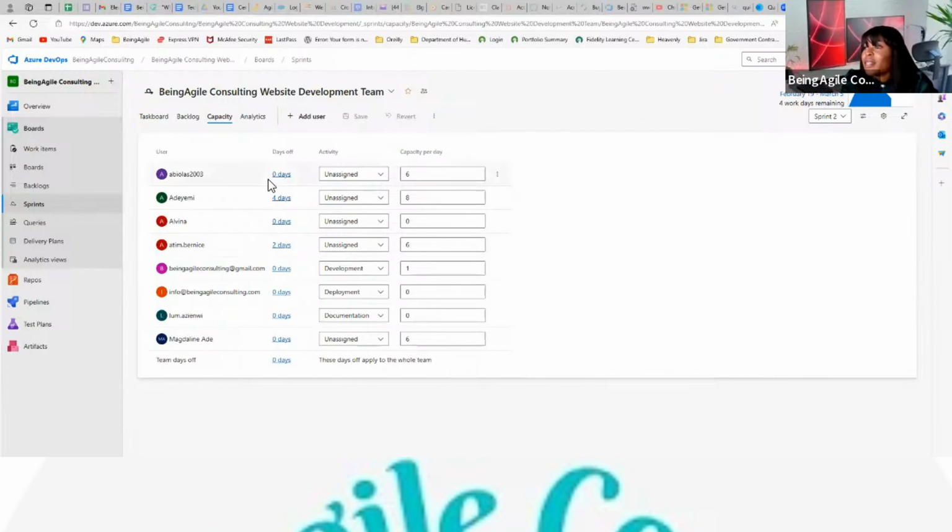That's the first thing. And then the second thing, the team members should understand, again, it depends on the organization. Some organizations consider full-time employees' productive hours to be 6 hours per day, assuming that 2 hours per day would be unproductive, just kind of wallowing around and not really doing anything, taking breaks, going to the bathroom, chit chat.